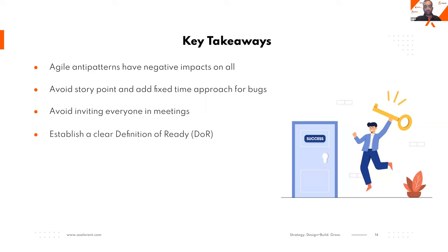Definition of ready. Before you start anything, a sprint, even retro events, even the daily scrum, you can think what you can achieve out of it. You can even say, this is our checklist for making sure this ticket is ready to be taken in a sprint. Prevent mini waterfalls. A simple question to everyone is, how can you start adding value from day one in a sprint? That is a very easy way which will avoid mini waterfalls in Agile.